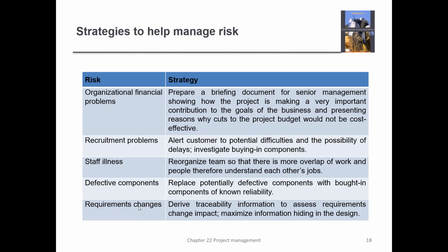So if there are requirements changes, in order to manage that risk, you need to develop in your requirements documentation, for every requirement, who specified that requirement, and what impact a change in this requirement would have on the software project.